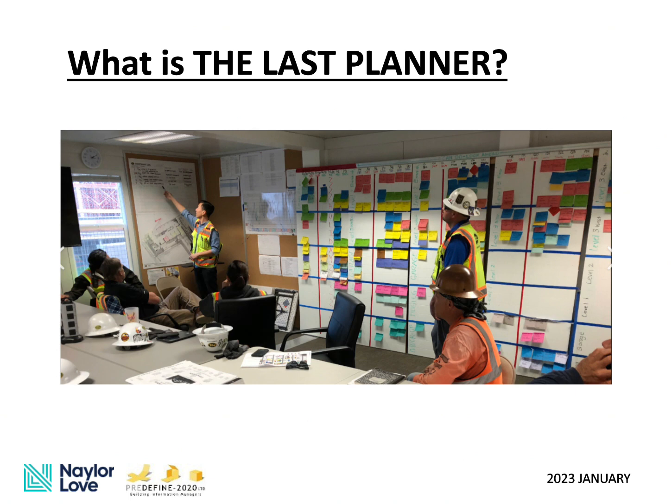It is seen as a managerial approach on how to efficiently run a construction project, and it is widely used across Naylor Love projects. Look-ahead planning is done regularly each week. Traditionally, this process is performed by key people from all organizations involved in the works and led by the site manager. A wall chart is used, where sticky post-it notes are placed to show what group is to work on what area of the project.